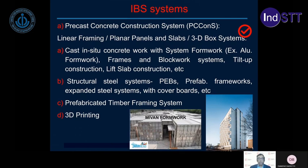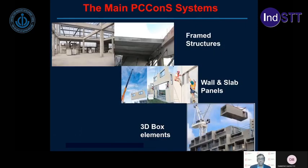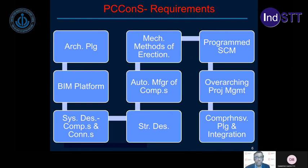Of the various IBS systems available, I will be focusing mainly on precast concrete construction systems, which I'm calling PC-Cons. There are three broad systems in precast concrete for buildings: the frame structure with infill panels or walls and slab panels, or 3D box elements. The basic requirements for precast concrete construction start with architectural planning, facilitated by a BIM platform, then systematic design of components and connections, structural design, automated manufacture of components, and mechanized methods of erection at the site, with supply chain management to bring components in the right order.